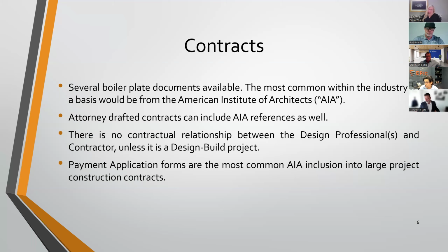One thing that is important to understand is that the overwhelming majority of community association projects tend to be design-bid-build projects, meaning there's no contractual relationship between me, the designer, and Rudy, the contractor. We are both hired by the association, or by the client.